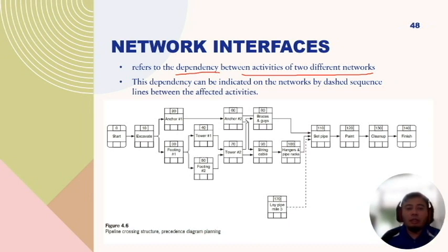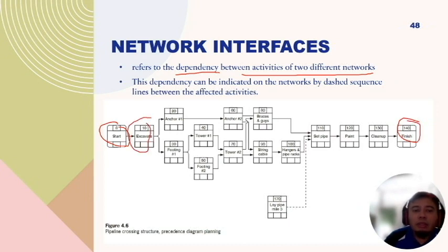In this example, you have start here and finish here. The work starts with excavation, then goes into anchor number one, then the footing and so on, up until you complete hangers and pipe racks and braces and guys.